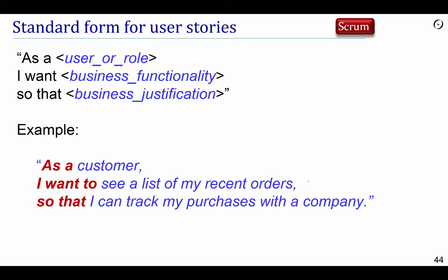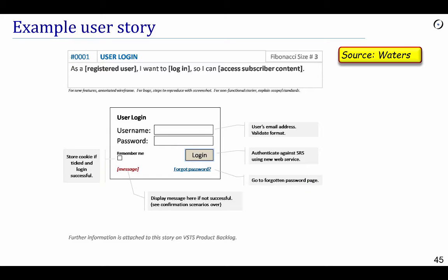be it Amazon or anything else. And the idea of requirements in Agile development is not that you write a requirements document at the beginning. That was the traditional and current approach. It's that you pile up requirements in the form of individual user stories, and then the accumulation of these user stories at the end is going to give you a system as you implement the user stories. But you produce the user stories as you go, not all at the beginning, and then you implement them right away in the following sprint.